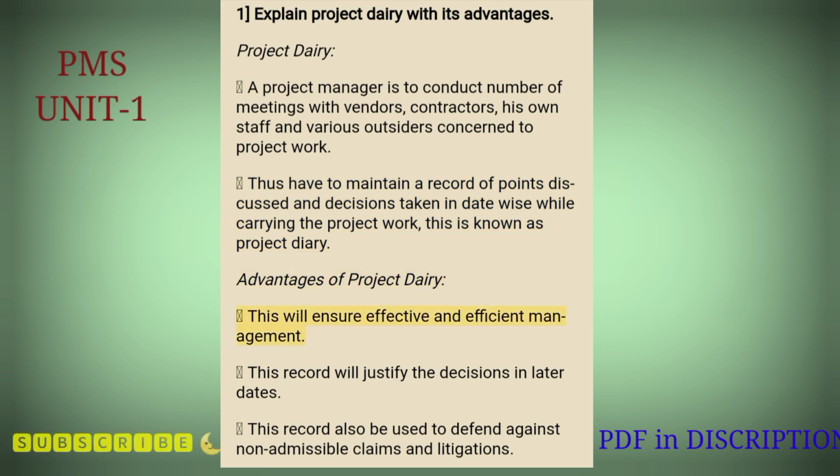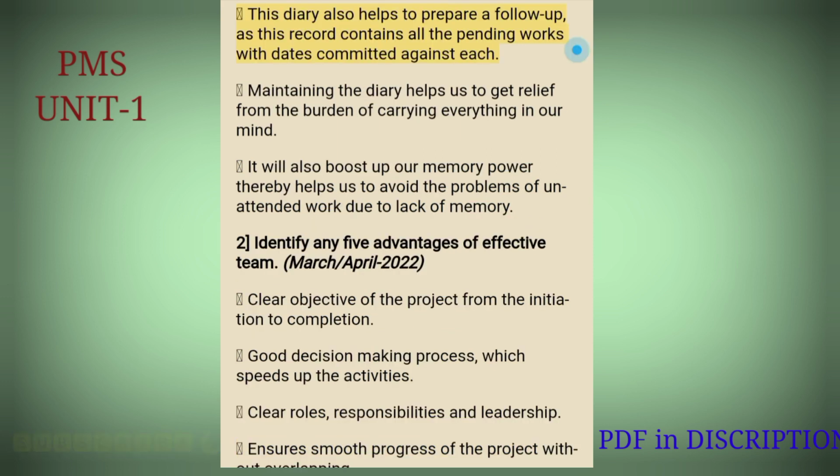Advantages of Project Diary. This will ensure effective and efficient management. This record will justify the decisions at later dates. This record can also be used to defend against non-admissible claims and litigations. This diary also helps to prepare a follow-up, as this record contains all the pending works with dates committed against each.